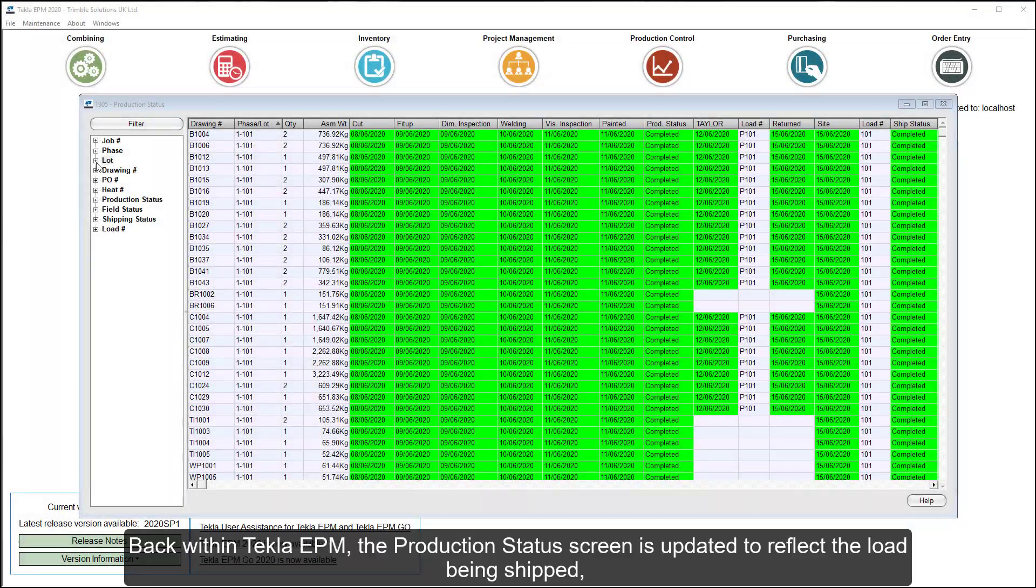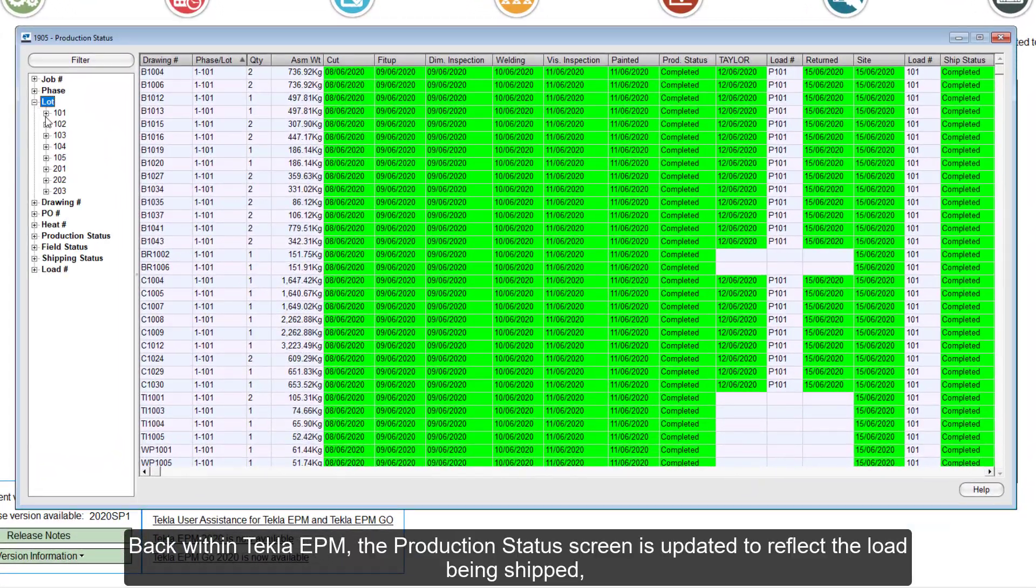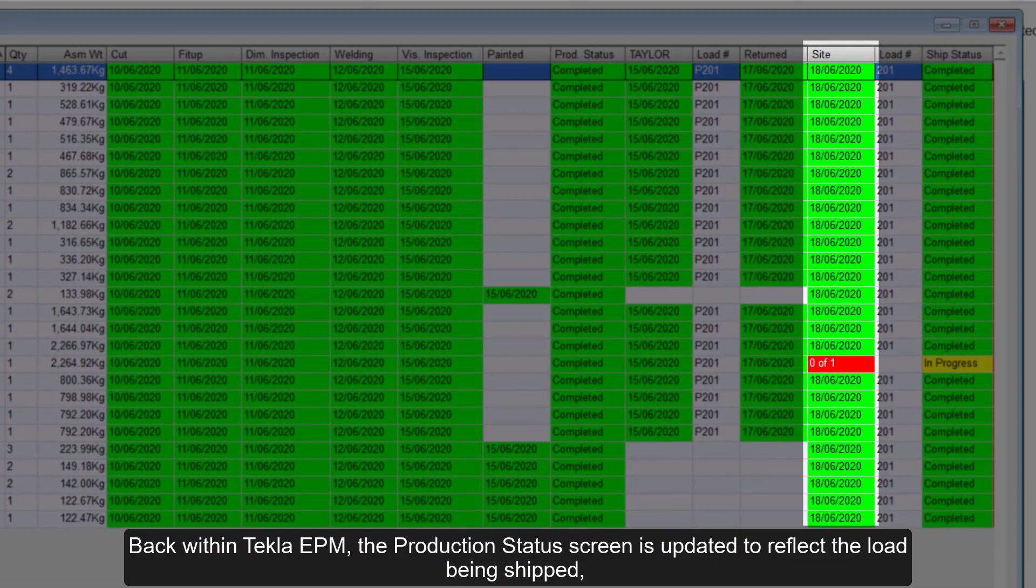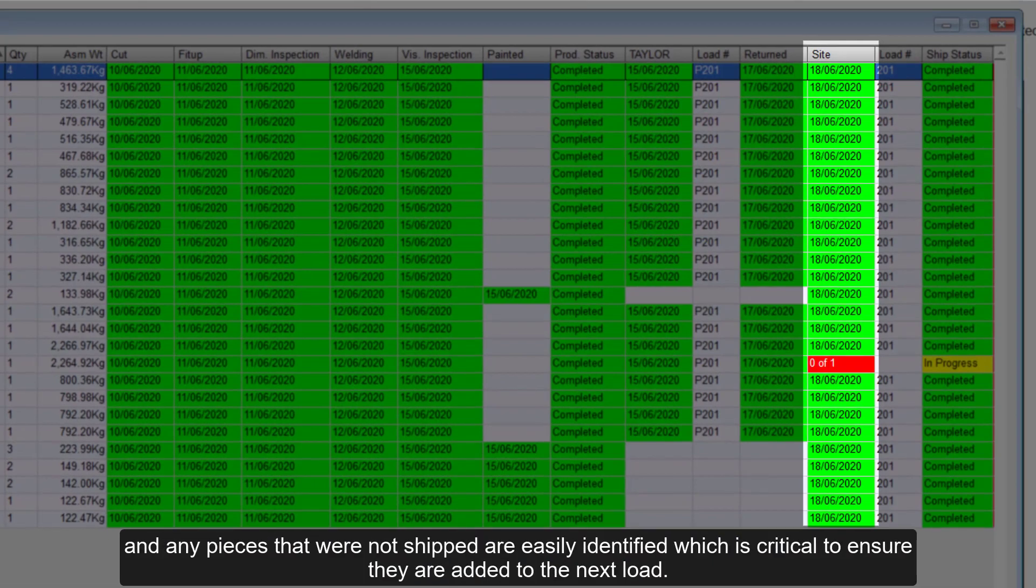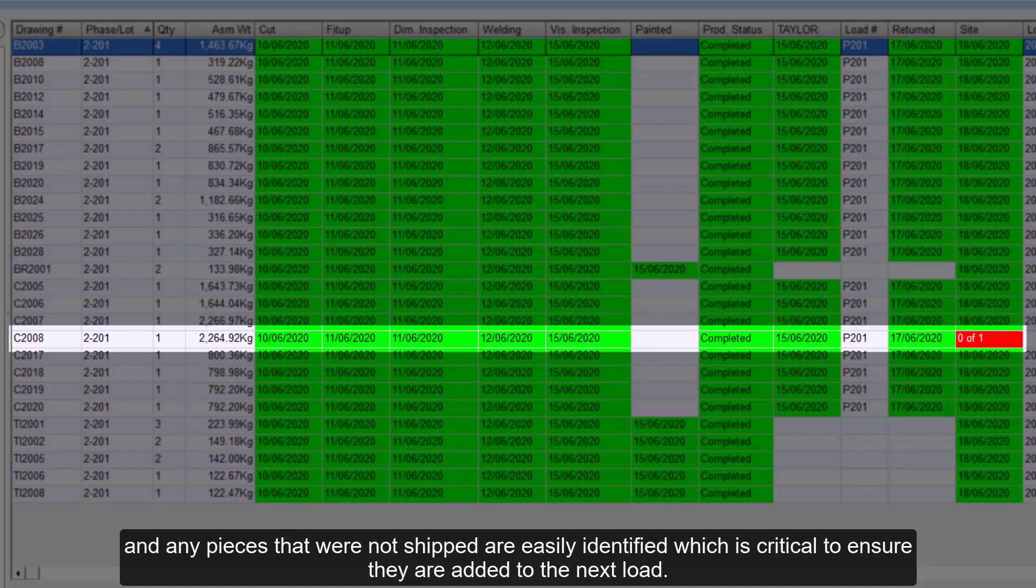Back within Tekla EPM, the production status screen is updated to reflect the load being shipped, and any pieces that were not shipped are easily identified, which is critical to ensure they are added to the next load.